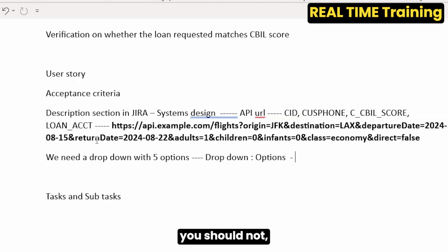You should not mix hours and user story points. Based on story points, we are able to judge how complex or lengthy a user story is. If it is 8 or less, it can easily fit into one sprint. More than 8, which is 13, cannot be completed in 3 weeks. If it is 13, you should not.